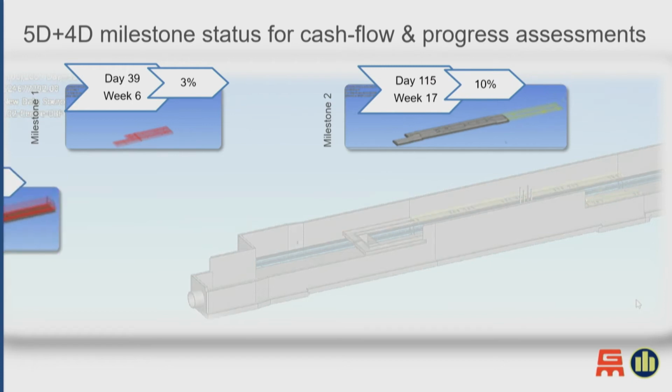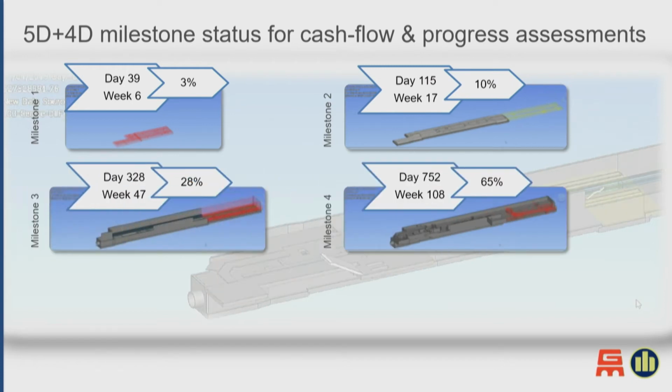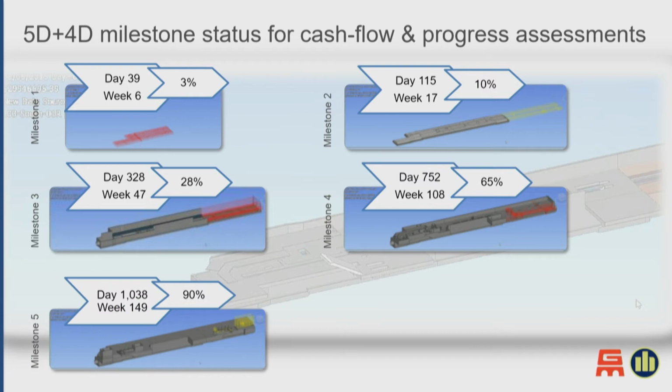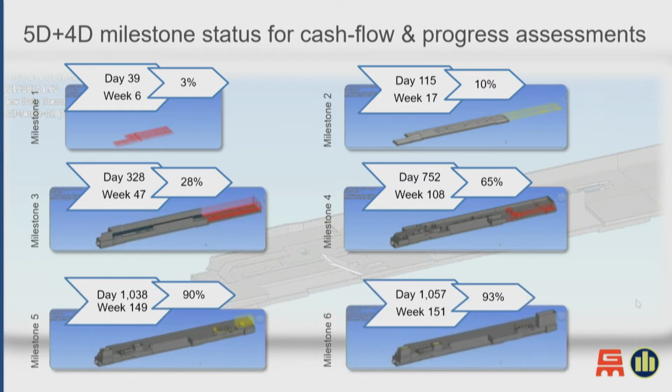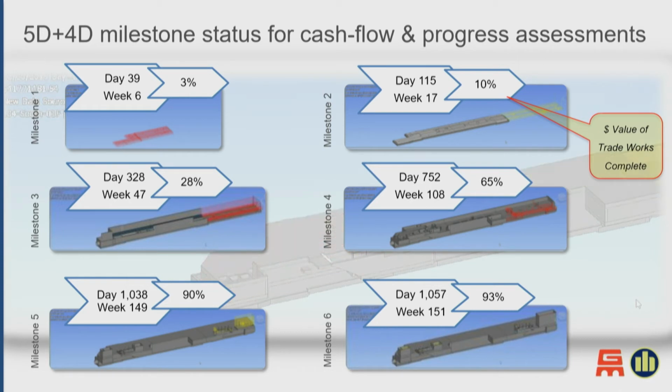So here's how we break it down: by a certain point in time, how much should we have spent, how much have we spent, and actually coordinating the actuals on a job. Rather than a traditional claim, where someone goes and assesses it, have a bit of an argument, and agree roughly where that percentage should be, this is working on actuals, actual quantifications of every bit of that model that was broken down into work breakdown structures.